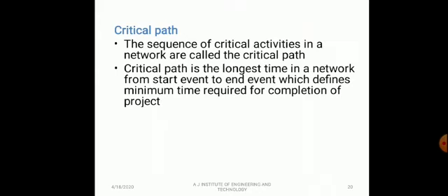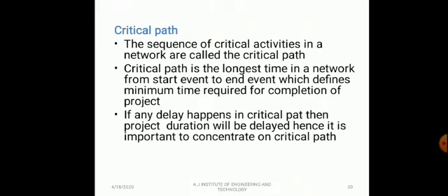Critical path is the longest time in a network from start event to end event, which defines the minimum time required for completion of the project.